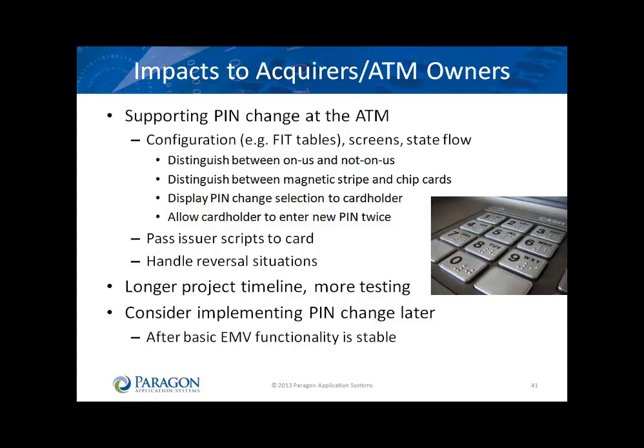Adding support for PIN change at the ATM will add time to your project. A lot of testing is required. You might want to consider implementing PIN change later, after you have implemented basic EMV functionality, complied with mandates and the liability shift, and you are comfortable with the technology and the data associated with EMV.